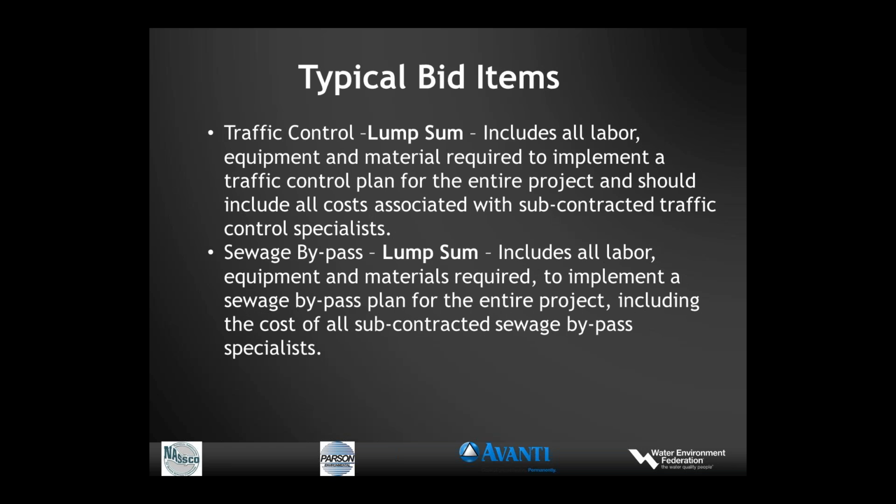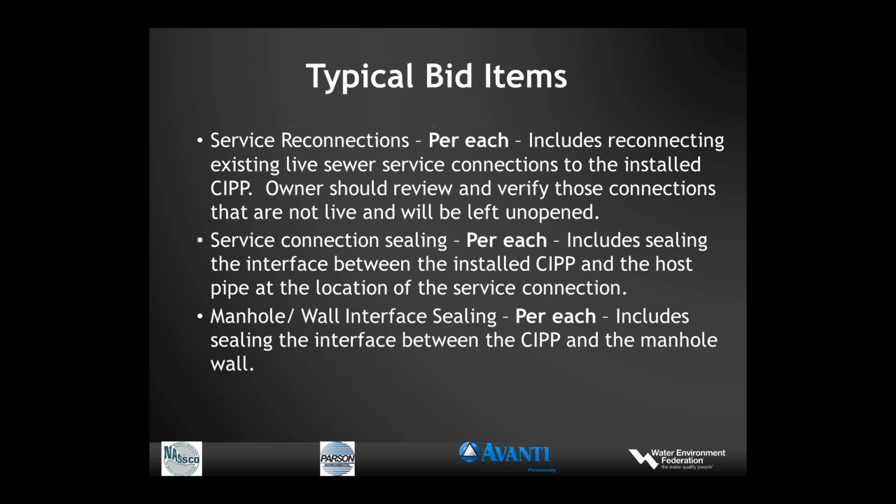Two different duties that may be performed by subcontractors. Payment needs to be spelled out. Service reconnections and service connection sealing, in addition to manhole wall interface sealing. Often that is included in the installation of the CIPP, but it can be included as a specific pay item.